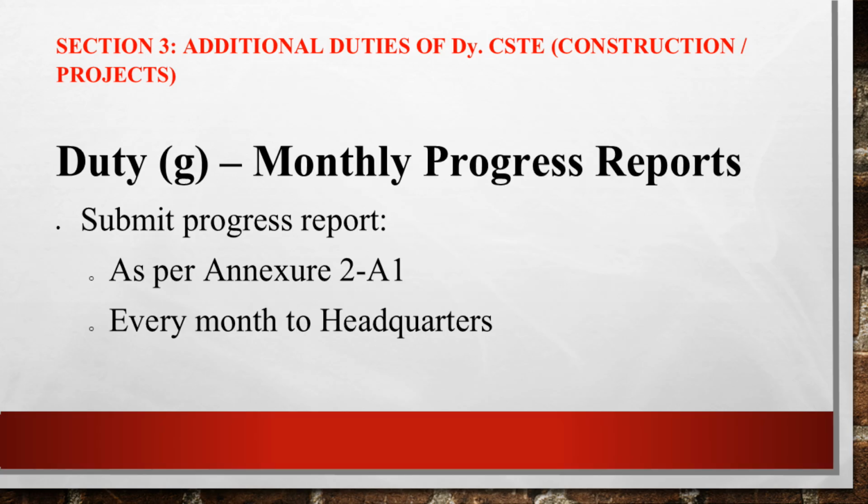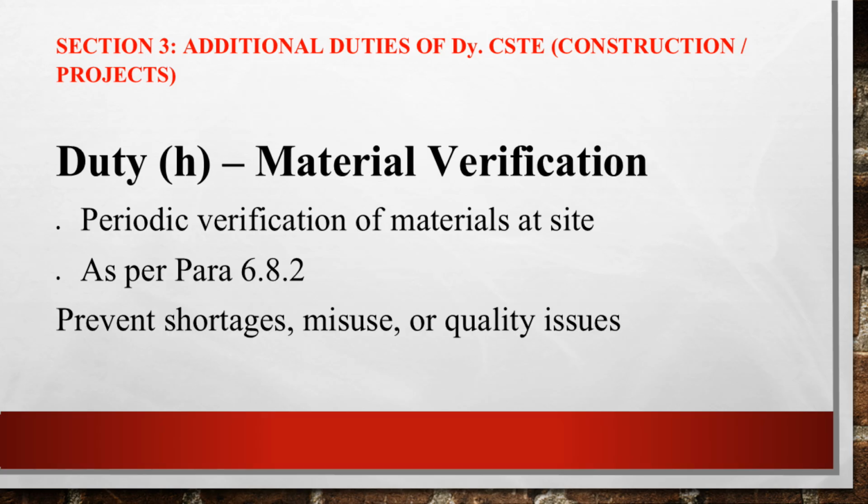Progress reports. Monthly progress reports must be submitted to headquarters as per annexure given in SCM. Material verification. The Deputy CSTE must periodically verify materials at the site as per para 6.8.2, ensuring quality, correct usage and proper accounting.